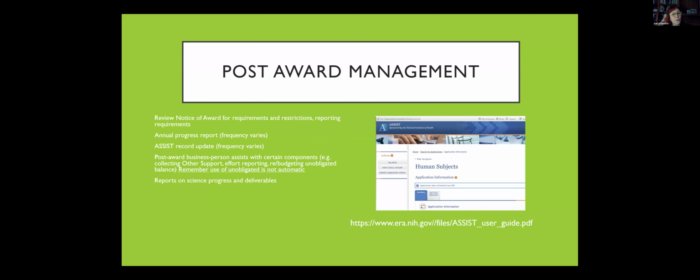And then, of course, there's always post-award management. Usually that's a whole separate team of post-award people, different from the pre-award people who actually got the award. But now you're working with people and you really have to make sure that all these costs are correct. One of the things we always get into trouble with, I do, being in the NIDA node, where I'm responsible for like 50 different places and subs, is that when a year ends you have to have all of your monies in and all of your receipts in.